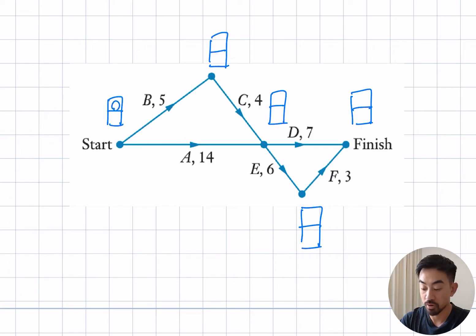Okay, let's complete a forward scan. So the first box is always going to be 0. 0 plus 5 up here will be 5. Now I've got one in the middle. So I've either got 5 plus 4 which is 9, or I've got 0 plus 14 which is 14. So let's choose 14 because that's bigger than 9.